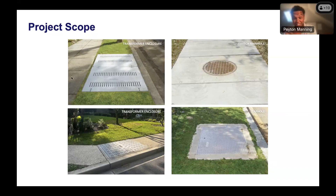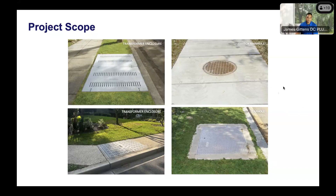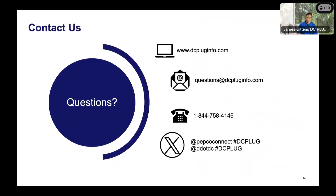Linda asked whether transformers are on poles in the alley as well. The DC Plug program is intended to remain in the public right-of-way. Alley poles are often on private property, and the team typically tries to avoid those. There do not appear to be any alley poles included in this feeder's project scope.